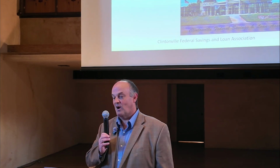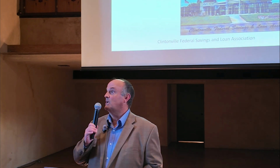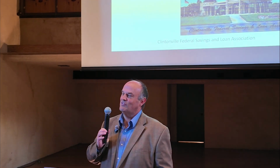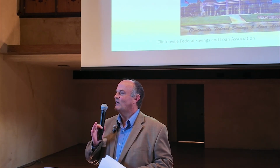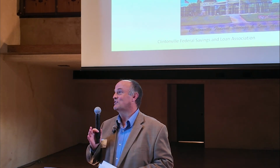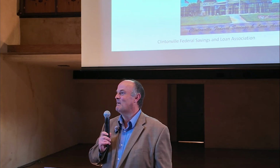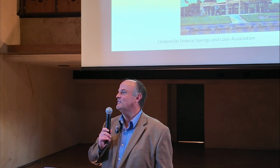As I've found with every project, and this was an interesting one because this was just conducted by a young couple. Everybody, whether it's a big developer or small building owner, they're very focused on the tax credit application before the project, and then once the project starts happening, they're just focused on the project. So you kind of got to remind them along the way of meeting all those Park Service conditions.